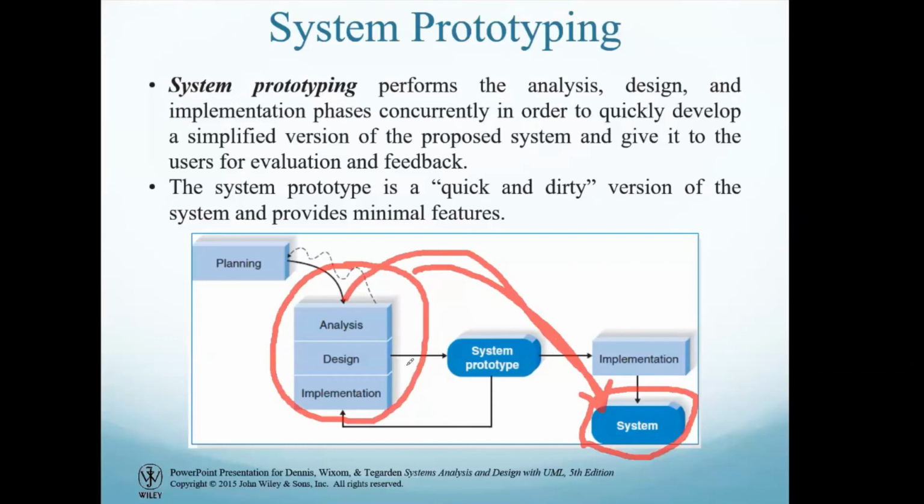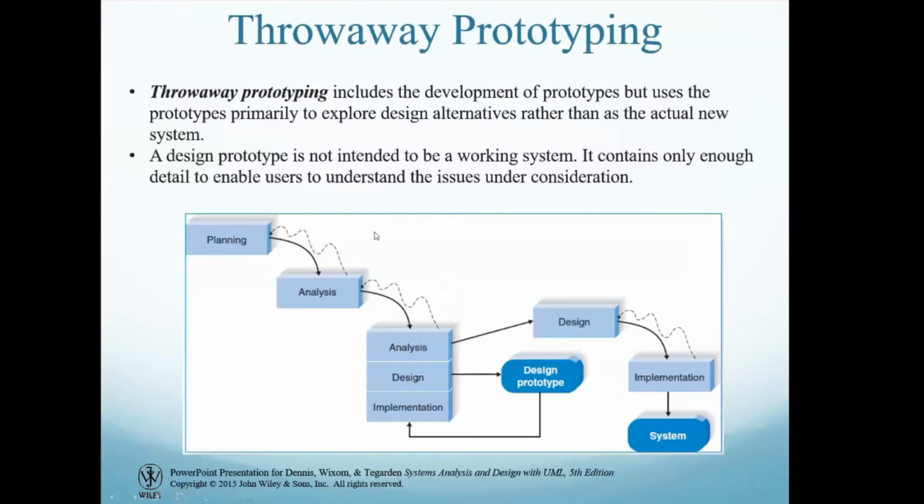There is another one which is called throwaway prototype. You see, throwaway prototype. In throwaway prototyping, the prototype is totally dummy. Okay, totally dummy. This one is 100% dummy software. It is a prototype just shown to the business or the company or the other organization. When they see the prototype, they can give feedback. Some say yes, it is okay. Some say no, this one is not okay, it should be like this. So you see, you quickly get feedback, quickly get approval. Some are approved, some are rejected, and some feedback you get.